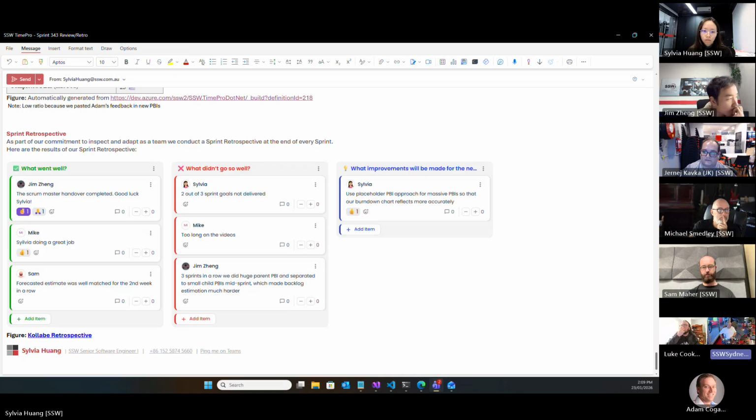Yes, JK. For clients, the way we solved it quite a few times is we just showed the feature before we record the done video. We get feedback, we implement the feedback. It saves you sometimes hours doing that. Yeah, a lot of teams do that. They quickly want to show it to you.